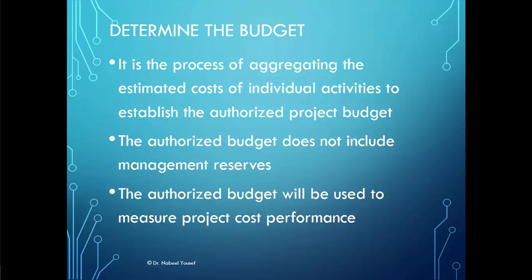The authorized budget does not include management reserves, and we can use the project budget to measure project cost performance. Are we within budget? Are we out of budget? Did we use more money than was assigned for us? And this is considered a measure of project cost performance.